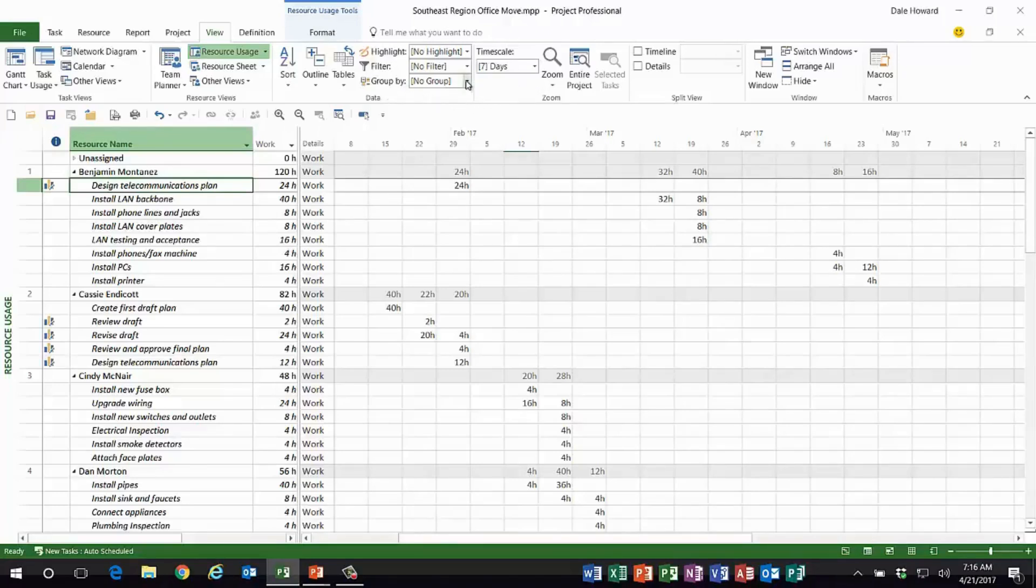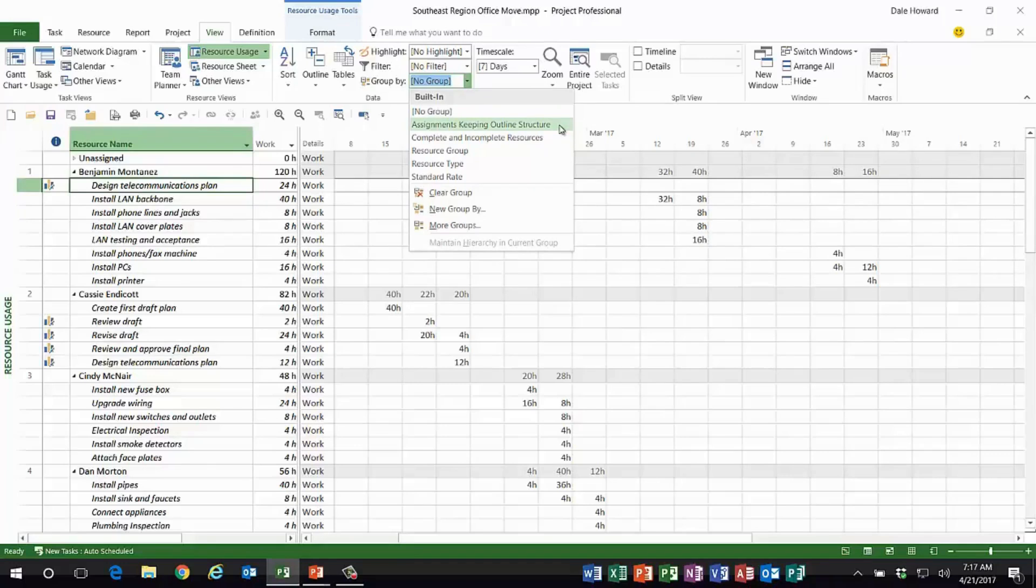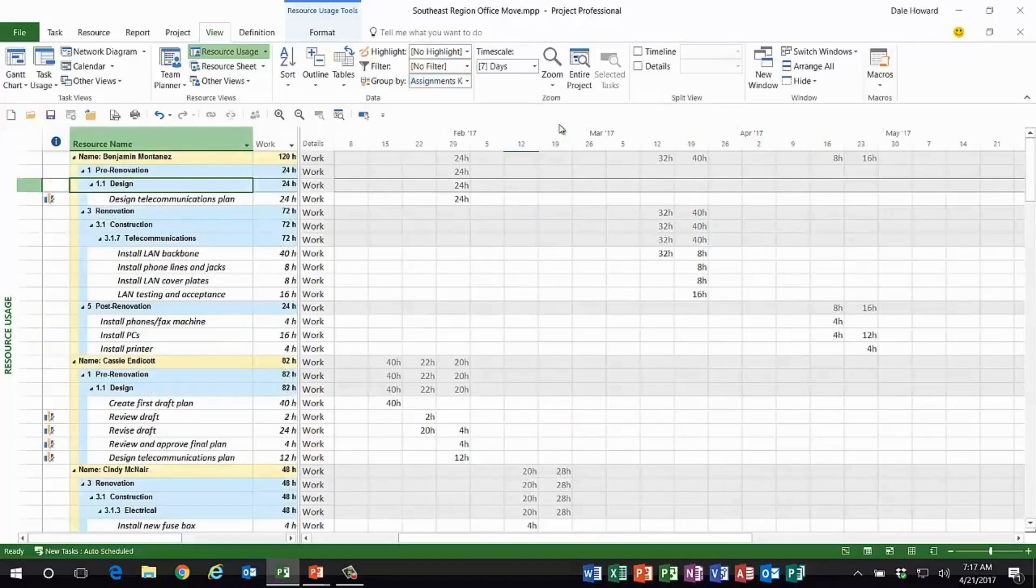On the group by pick list, there is a group most people don't realize is there. It's called 'assignments keeping outline structure.' It's been there for many years, we've just never noticed it, probably because you can only use it in the resource usage view. You cannot use it anywhere else.